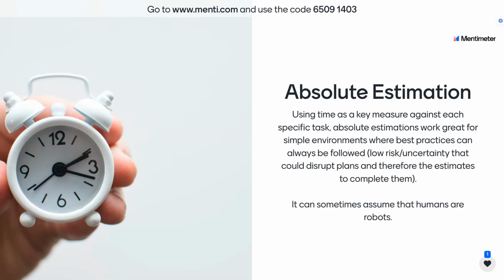So unfortunately, that technique, when scaled or applied to complex environments, can assume that humans are also robots, right? And if we say we're going to take an hour to do this task, it assumes for that full hour we're going to solely concentrate on that activity and nothing else. And I'm sure we could all agree that in a COVID world now where we're working from home, we've got multiple demands to attend to, whether it's personal or professional, disruption is a common factor amongst our lives. Therefore, dedicating complete focus 100% of the time is getting harder and harder. It makes estimates even harder to do following this technique.